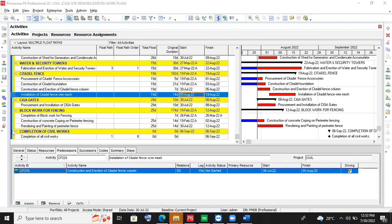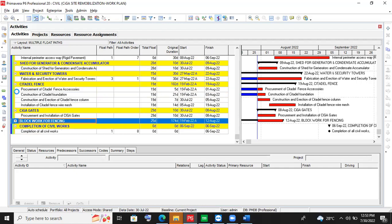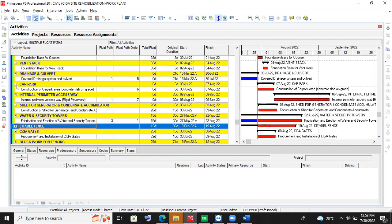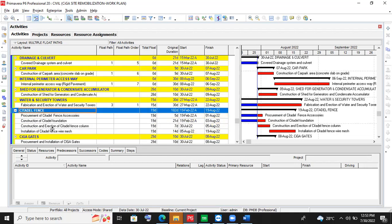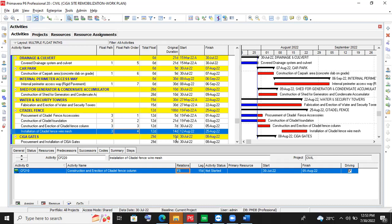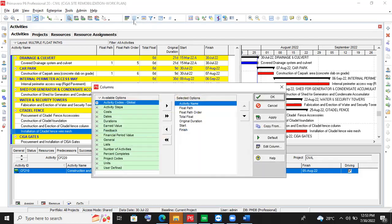So now this activity — it's a live video, so let me hide some information. Now the predecessor: you click on this predecessor tab. So the predecessor is construction and erection of started French column. But see, it's ongoing, it has not finished, and the relationship is finish to start. So if this activity cannot start until the predecessor has finished, and the predecessor is ongoing and has not finished, let me bring the progress percent complete.